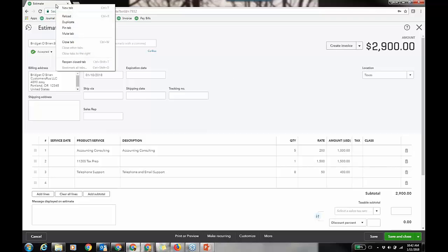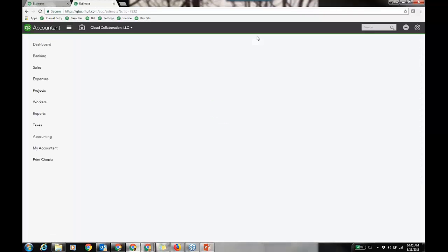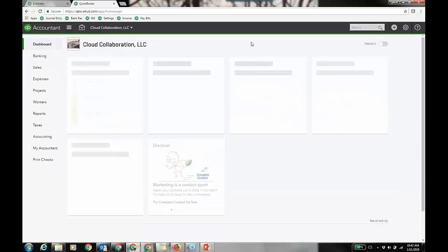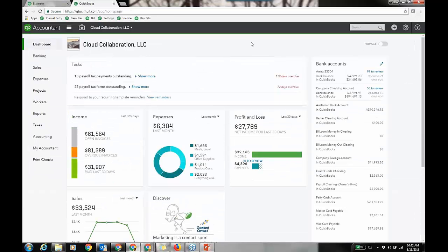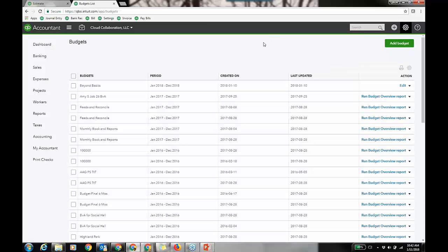Now, also, let me go duplicate. Might as well do all these at the same time. Because I want to see some budget versus actual for what's happening before we enter transactions from the project center, I did create a budget, right? So that's not a setting. You can just go to the gear icon, budgeting under tools. And though we don't have a balance sheet budget, it's just at the P&L level. But really, this is all I'm needing. I did this budget yesterday.